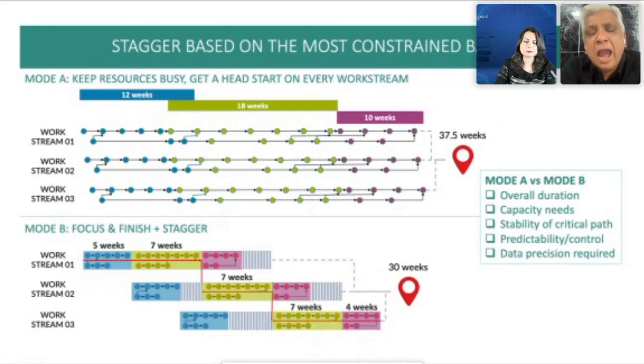Okay, so I don't know the exact context of the question, but if by work package you mean each of these boxes is going to be a work package, maybe not. Sometimes in our situation, this entire thing could be one work package, or the work package given to a contractor could be all the 3 blue tasks. So you are creating these boxes, but these boxes don't represent work packages. They are just groupings of tasks.